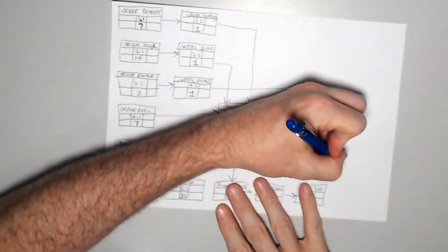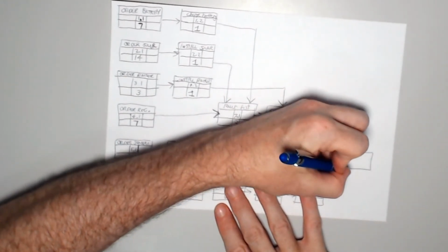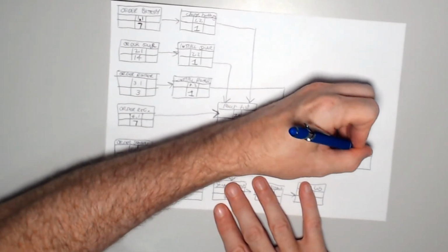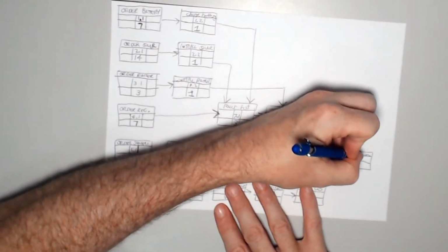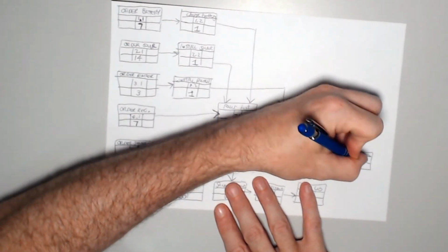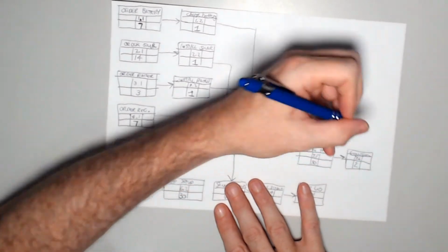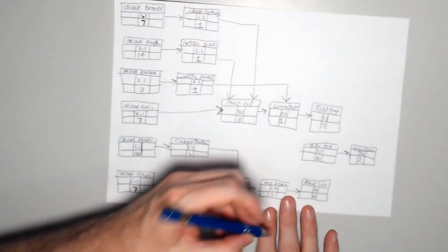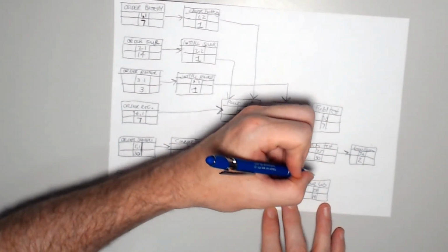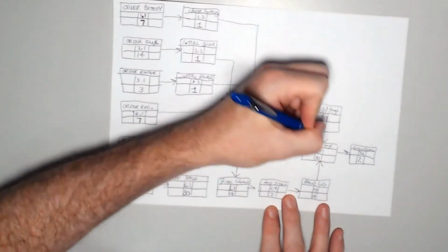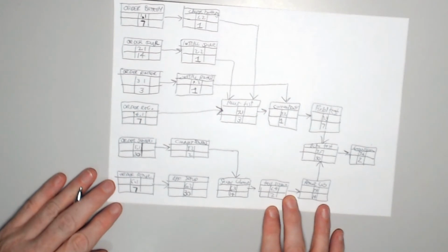And then finally, once we're happy with our system, we're going to commission it. So install it out in the field, have it ready to go. You start collecting real data. So that was 7.6. It's going to take 2 days to do the install. I haven't done all the arrows here. So after the lab test, the beta test is after that. After this field test, the beta test is after that. And we're done with our network diagram.